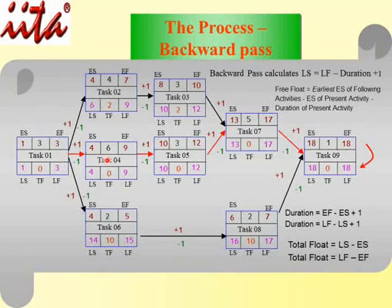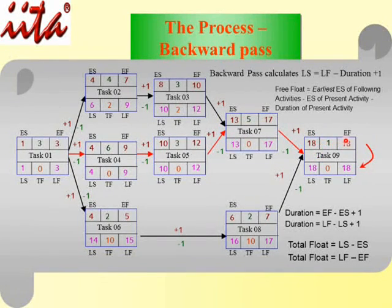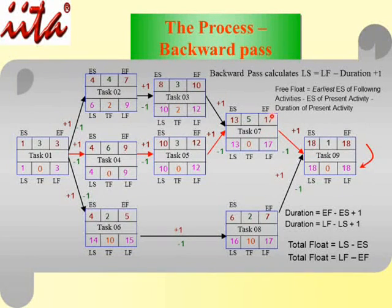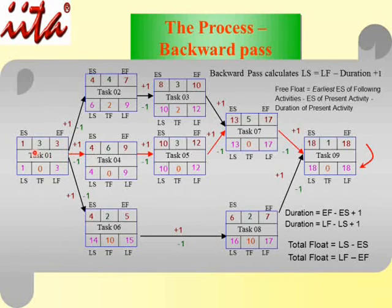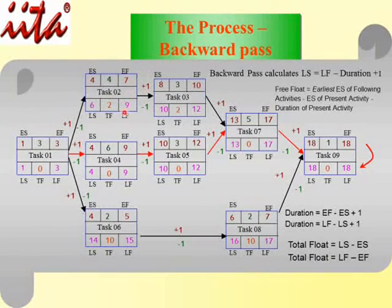You can now see the critical path — shown as the red path. Along the critical path, the EF and LF are the same, and the ES and LS are the same, meaning there is no float. For example: 17/17, 13/13, 9/9, 4/4, 1/1 — these matching values confirm the critical path. On non-critical paths, the ES and LS are different, and the EF and LF are different.